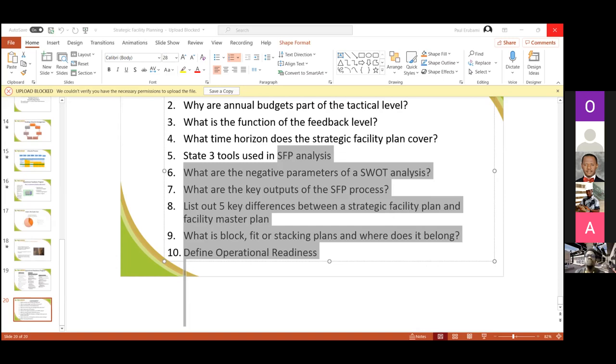For example, if you are trying to solve a power problem, you think generator, right? What are the brands of generator? You research that. Who are the suppliers? You call, ask questions on the cost. What are the advantages and disadvantages of using a generator to solve this power problem? You research and write. Solar: if we're going to go solar, what is the capacity that we have to have? How many batteries? What is the advantage and disadvantage? How long will it last? What is the maintenance cost? So you are developing all of those alternatives with detailed analysis. It takes a lot of research.